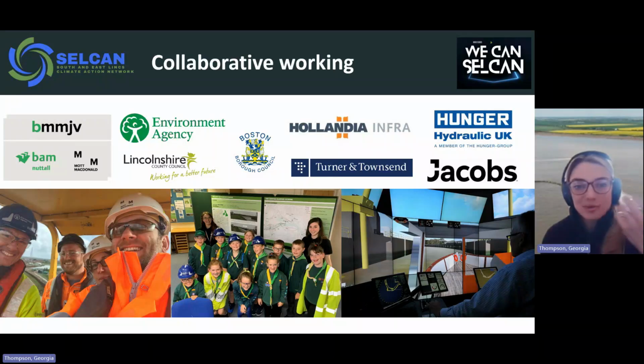This helped the whole river community understand the future navigation changes and allowed collaborative discussions to take place, which directly influenced our navigation management plan. As a result, we now have emergency landing facilities upstream and downstream of the barrier. So we know that the local community and stakeholders are important to ensuring we deliver successful outcomes.